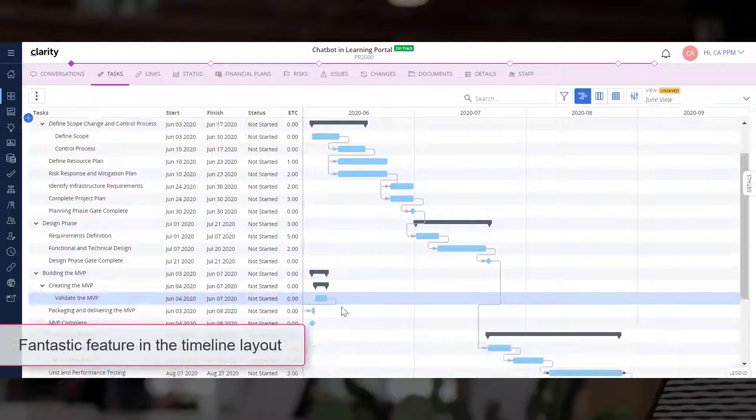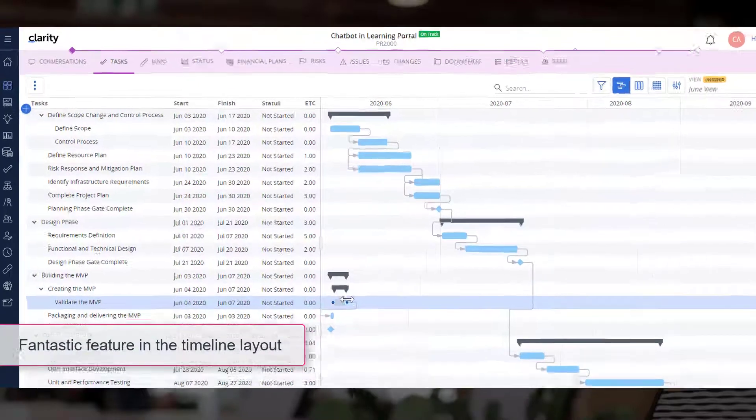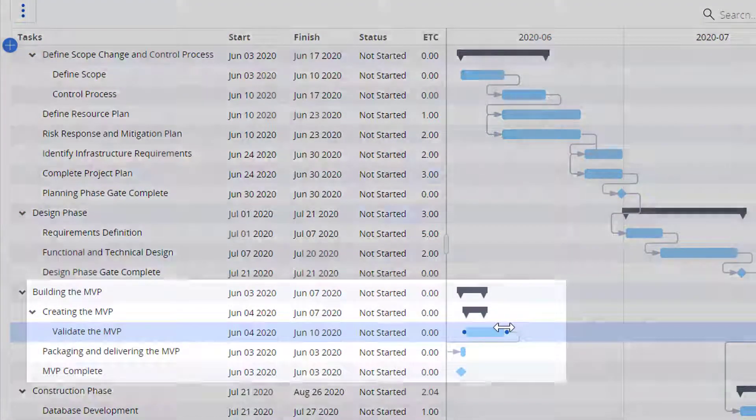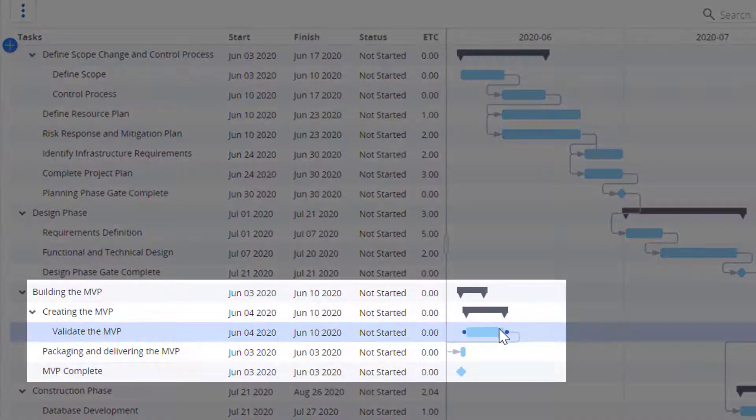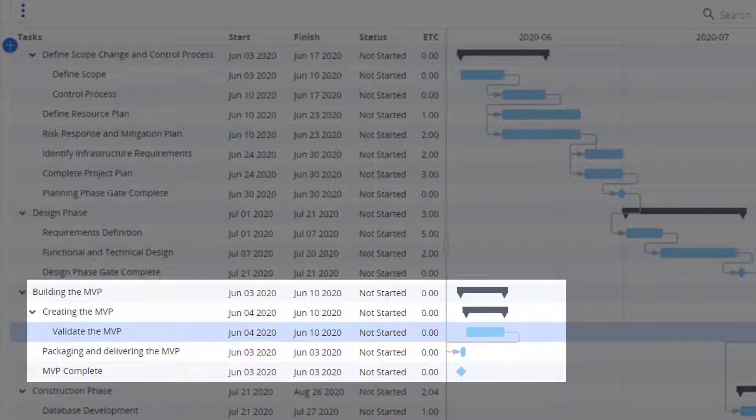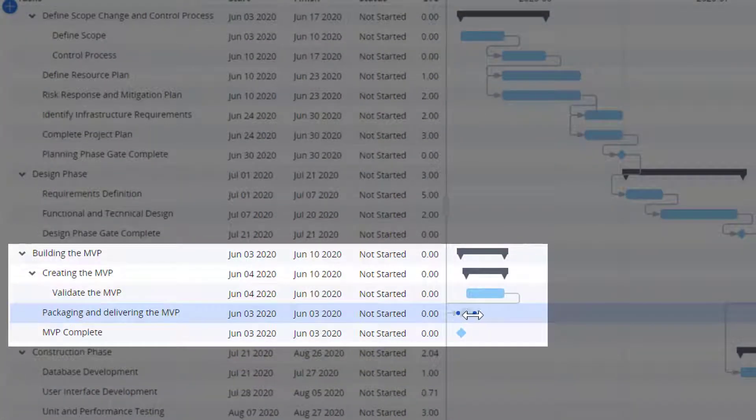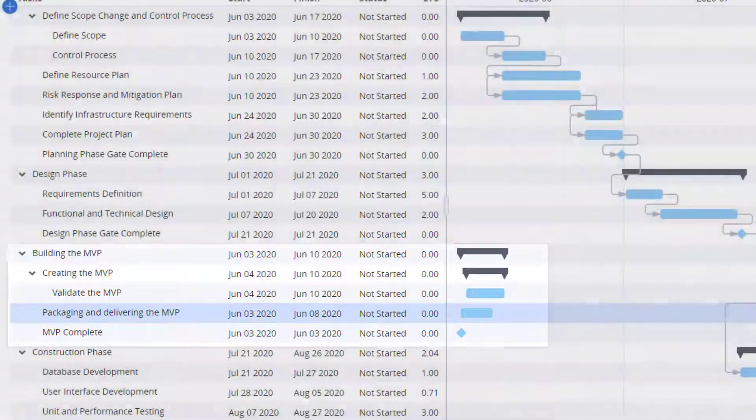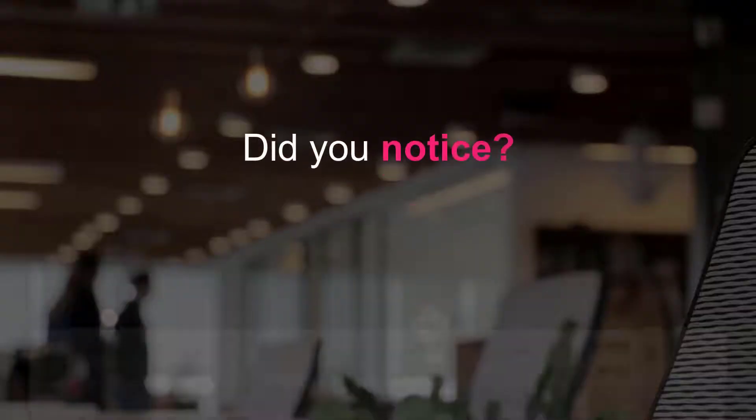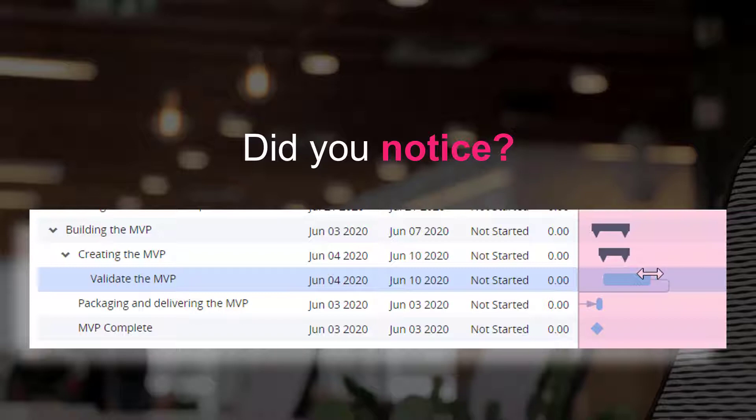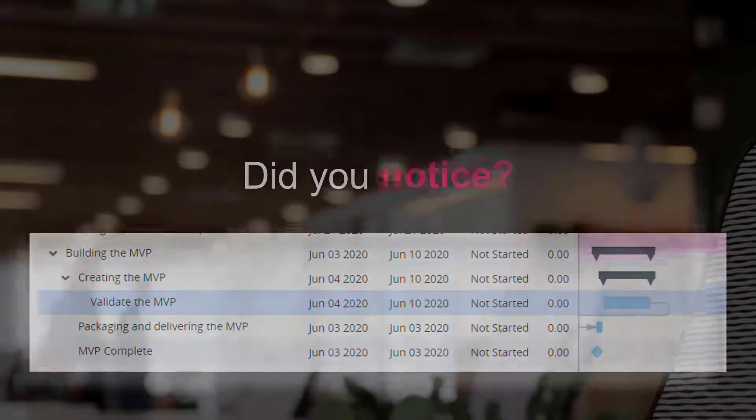A fantastic feature in the timeline layout is the capability to drag a task along the timeline and adjust its dates. Let's adjust the dates for the second task. Did you notice that the duration of the phase automatically expands to ensure it covers all tasks under it?